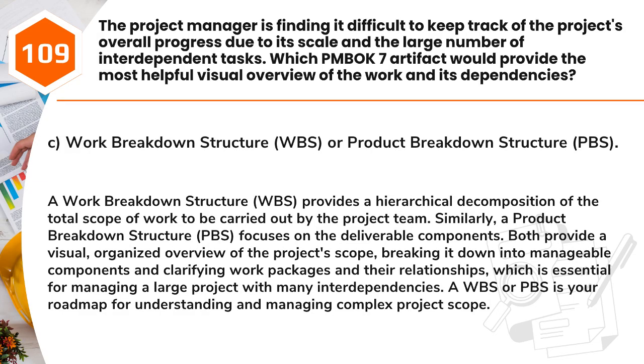Answer: C. Work Breakdown Structure, WBS, or Product Breakdown Structure, PBS. A work breakdown structure, WBS, provides a hierarchical decomposition of the total scope of work to be carried out by the project team. Similarly, a product breakdown structure, PBS, focuses on the deliverable components. Both provide a visual, organized overview of the project's scope, breaking it down into manageable components and clarifying work packages and their relationships, which is essential for managing a large project with many interdependencies. A WBS or PBS is your roadmap for understanding and managing complex project scope.